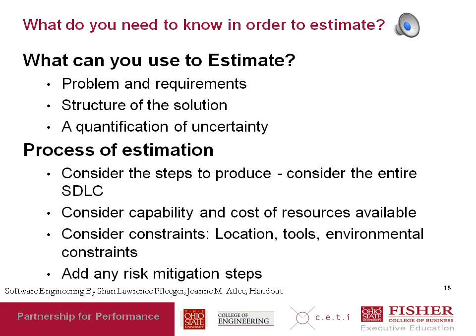In other words, you would consider the software development lifecycle. You would take a look at your project schedule and say, these are all the steps I need to do. And then you would estimate each step, and you could add them all up. While in your estimate of those steps, you would consider the capability of the resources. So if you have an expert team, an expert requirements team that has done requirements analysis many times, you might say that you might reduce the estimate for a particular step in the project, which is the requirements collection step.